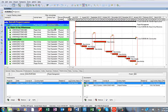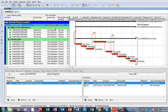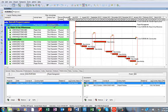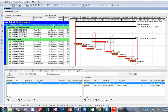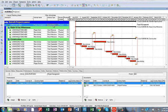They couldn't find the bar after applying the Level of Effort, which is one of the activity types. What happened is that when you apply Level of Effort, the bar doesn't show up. Just before going on, the Level of Effort, just like the WBS summary, is an activity type used to summarize a number of activities and in most cases to apply high-level resources.